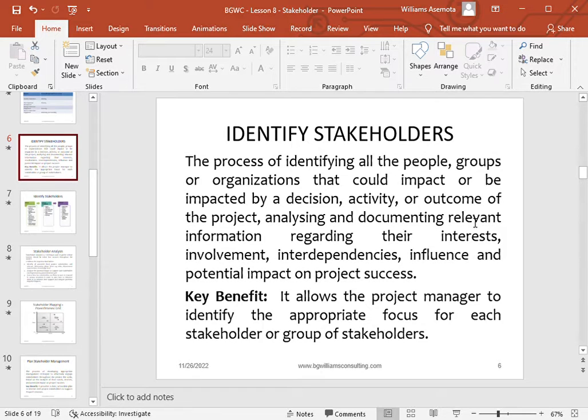Do you know that the moment the laborers are done, they are done in that project, so they can step out. So a time will come in your project when you need a new set of stakeholders, maybe you are bringing in an electrician, or a plumber, or anybody that was not part of the beginning, which means identification will have to start all over again.